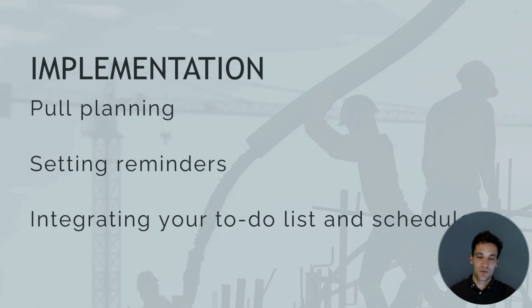It can help you with implementing pull planning, so looking at an activity that's coming up and working out everything that needs to be done before. And it basically can help you turn the schedule into a set of actions and tasks. Now, this fits into what we were saying in project integration management. It's a very similar concept. We can use the schedule to help plan out specific tasks and when they need to be done by, and then we can allocate them to individuals.